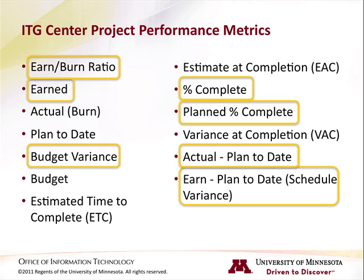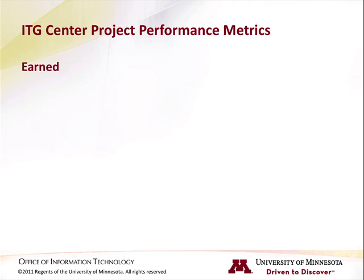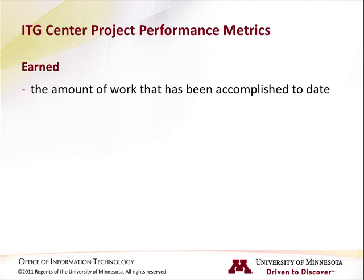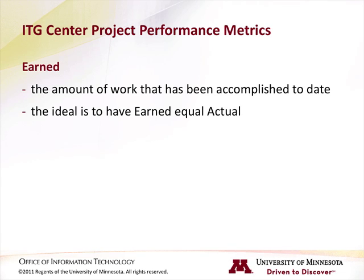Let's start out by looking at earned, and then the earned-burn ratio. Earned represents the amount of work that has been accomplished to date. It's how much you've accomplished for the time you had planned to spend. If everything is going according to plan, then earned should equal actuals. Industry-wide, there are several different methods for calculating the earned metric. At the university, we use a simplified method based on the overall percent complete. The calculation looks like this: Earned equals budget times percent complete.